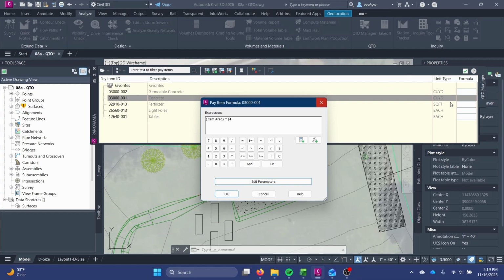That's the unit. Or sorry, we specified cubic yards. So I'm going to take this 4 divided by 12, which converts this into feet. And I think it will do it into cubic yards for us. I believe this is in square feet, then it's going to multiply by feet and then convert to yards, but we can find out together.